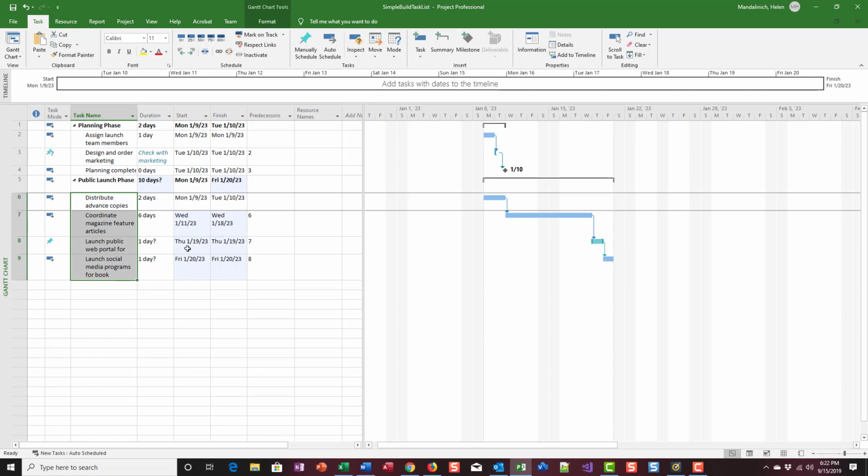So instead of having the verbiage there as a reminder that we have to get information, we now have these linked together, and a date can be determined for the start date. So that's one of the really nice things about linking the tasks and having them automatically linked, so that those things will automatically update when you manipulate them.